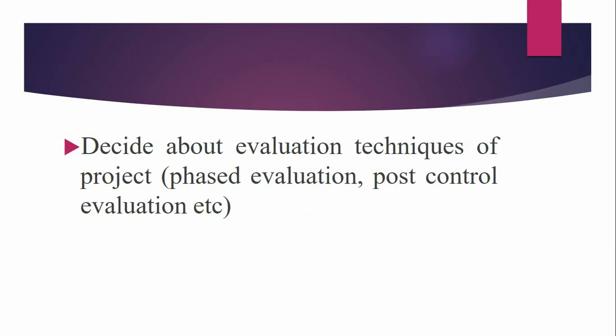After it, the evaluation techniques that will be followed during this project will also be discussed. Normally, the evaluation that is most preferable is the phased evaluation, which is also considered as staged evaluation, that performs some steps and then checks whether we are doing according to the standards or not.